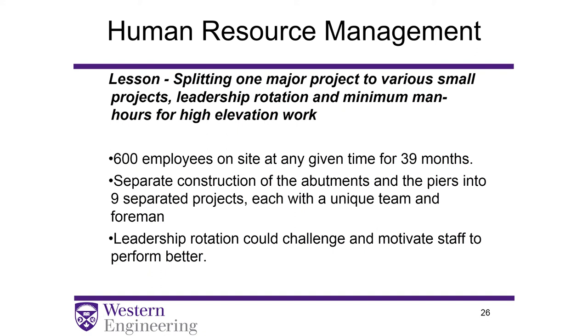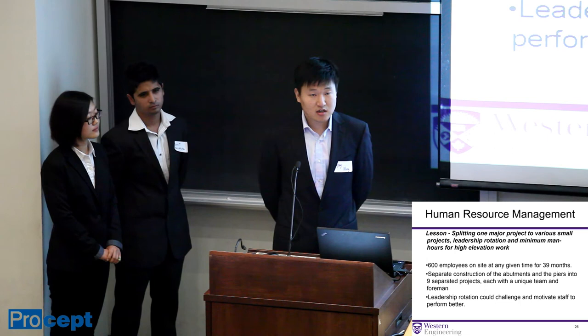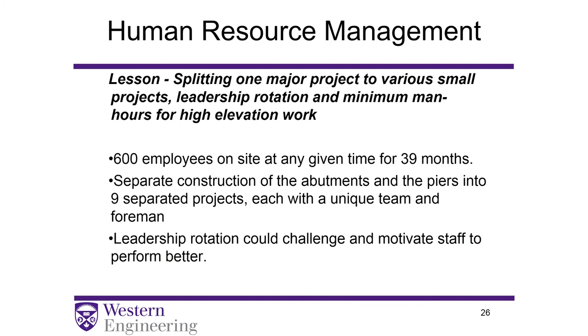And for this project, there are 600 employees on site at any given time for 39 months. So there are really a lot of people together for such a long time. And first of all, the security measure must be included in the staffing management. And the company separated the contractor of abutments and piers into 9 separate projects, each with a unique team and